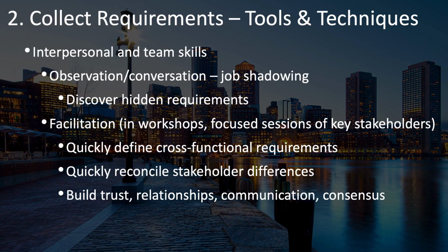Facilitation is also a valuable skill in collecting requirements. You may want to hold some workshops, which are focused sessions of key stakeholders, in order to quickly gather requirements. This type of face-to-face interaction allows you to quickly define different cross-functional requirements and to quickly reconcile stakeholder differences, because you have these stakeholders all in the room together, all at once. As differences arise, you can address them immediately, rather than finding these differences much later and maybe never finding them at all until it's too late.